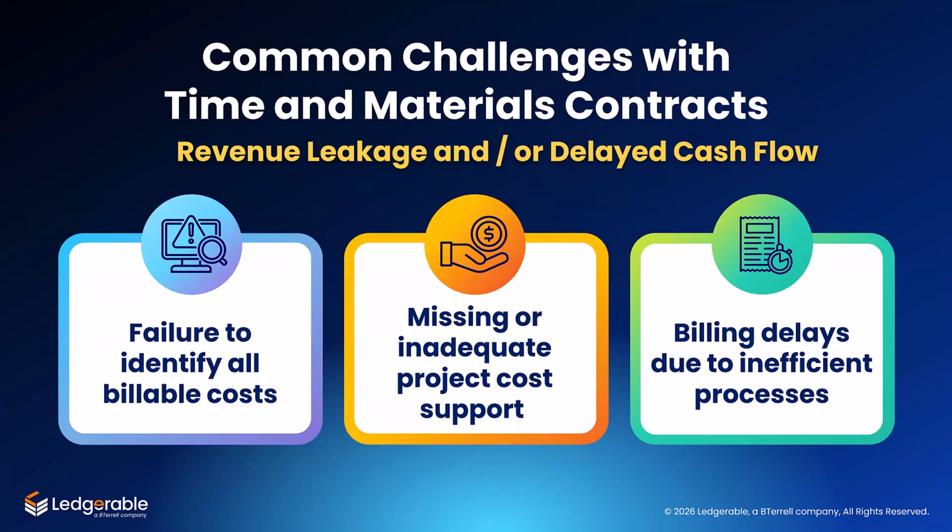Another related challenge is simply the additional effort of keeping track of and transmitting supporting cost documentation that usually accompanies customer billing. One construction firm told us that they spent over 200 hours each month scanning documents, updating tracking spreadsheets, reconciling billing, and then compiling merged documents for transmittal to the customer.